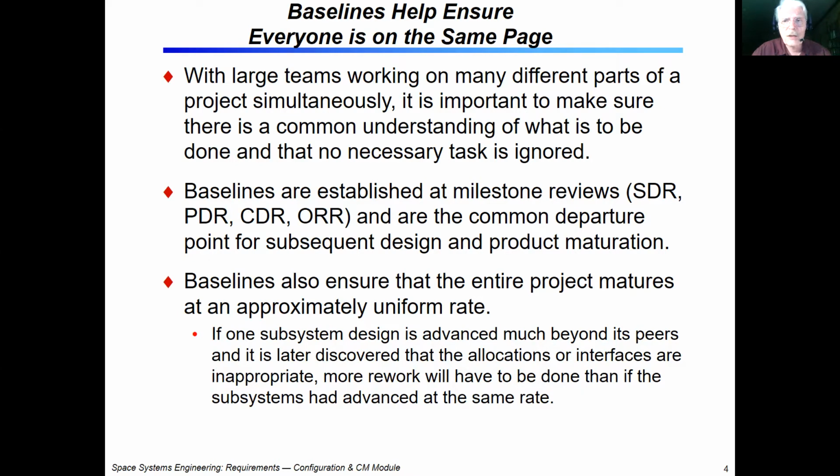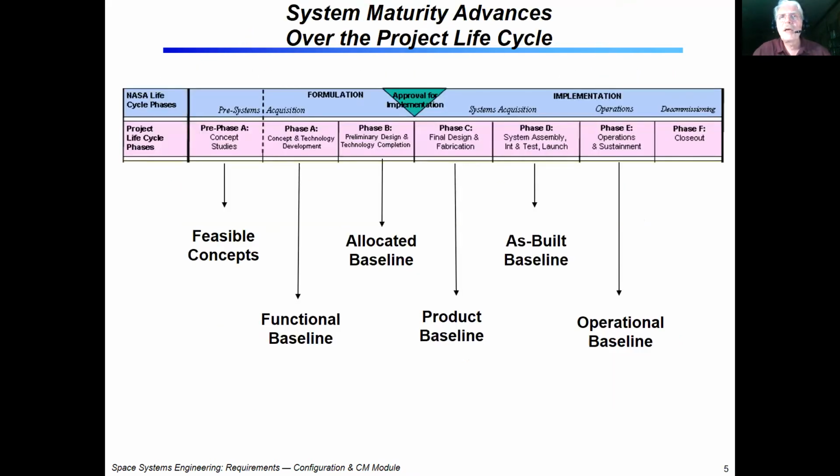We've talked about these reviews, and that is where you establish and discuss your baseline. So the PDR, CDR, FRR, those are your baseline descriptions. They capture all these bits and pieces that are going into your project. And those baselines will change. You start off with a baseline, and then as you go through your phase, there will be deltas with it. There'll be changes, and so you measure what your changes are relative to those baseline. All right.